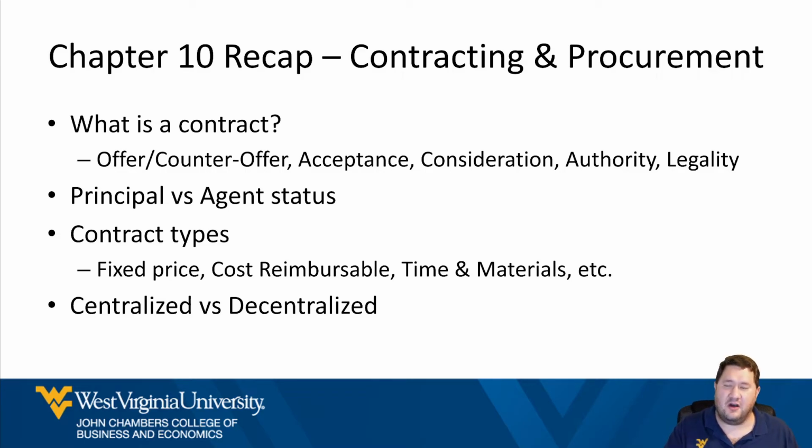The other one here, cost reimbursable. This one's a little different. This one's usually combined with fixed price. If you think of a consultant, for example, they probably charge a flat rate. Might be a daily rate, weekly rate, whatever, hourly rate. They're going to charge some fee, but then they might charge something on top of that. So they might say, if I have to provide parts or services or whatnot, then I'm going to charge you for that in addition. And usually there's a percentage tacked on.